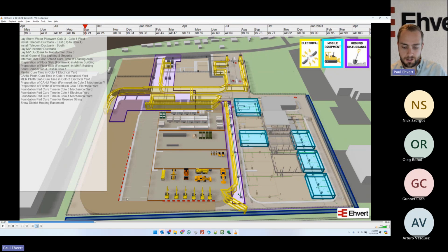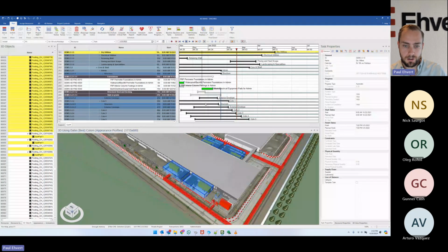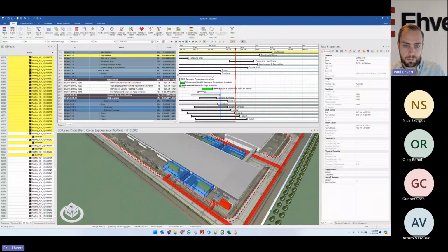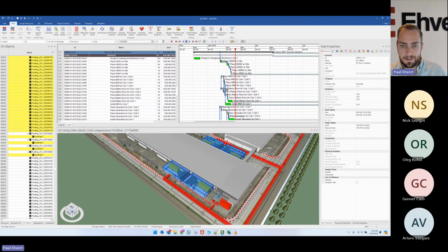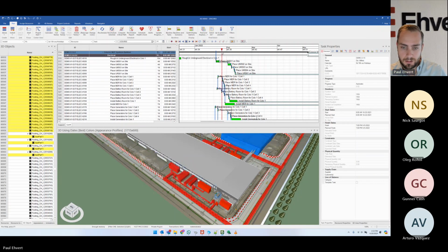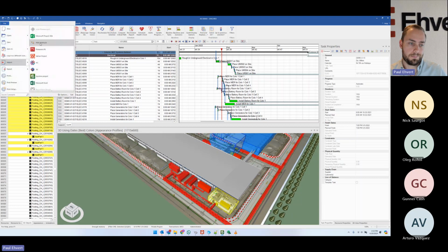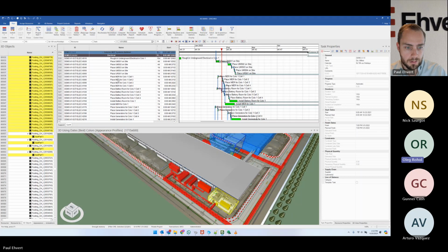And again, within the tool we use, it's called Synchro, to do it. This is another project we're just working on getting the background set up for, Austin. But we'll have here the Microsoft Project schedule that comes in here in your traditional Gantt view. And as we scroll through, it'll be tied to the model. We can basically just update the schedule by a new schedule import as newer or more detailed versions come through. Okay. That's good to know.